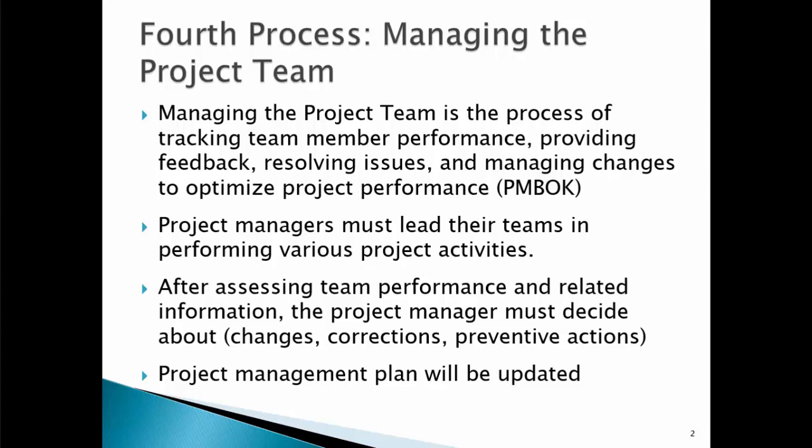The project manager role is to lead the team through performing various project activities and assess team performance to decide if any changes should be requested or if corrective or preventive actions should be recommended. In the case of any changes, the project management plan will be updated and all stakeholders will be notified.